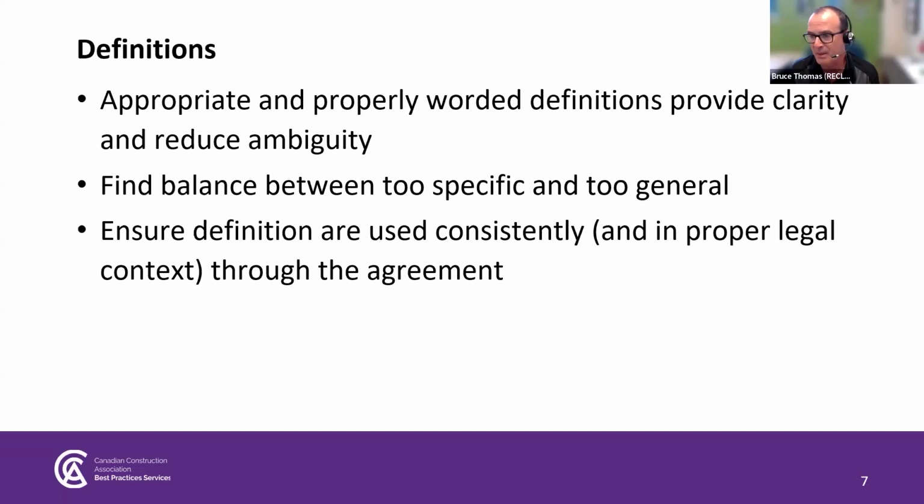In Ontario, just speaking from our perspective here, some definitions that typically get added might be around the constructor role in the Occupational Health and Safety Act, to make sure the Act is properly recognized in the agreement and that the role of constructor is recognized and what those health and safety requirements might be. And with the prompt payment legislation in Ontario, it's probably important to make sure there's a recognized definition of proper invoice, even if it's referring to the Act, because it's critical to the payment process. I'd be careful with definitions to make sure whoever's issuing the contract isn't getting carried away adding too much, or something that's not appropriate, but they are important.